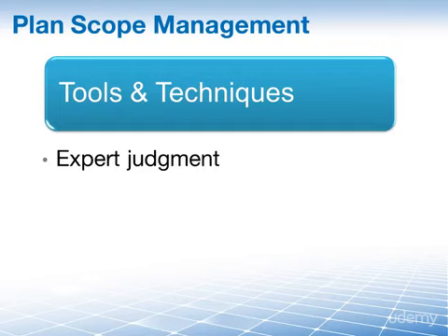You may even go back to another project manager who's managed a previous similar project and find out how they did it, what they put into their scope management plan and requirements management plan. And we solicit input from our experts by conducting meetings that are focused on the elements that are going to be contained in the scope management plan and in the requirements management plan.